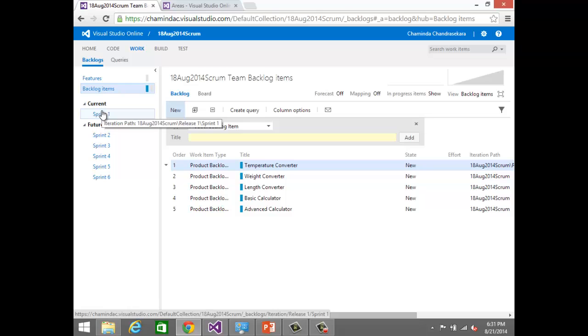Whenever you define a product backlog item or a user story or a requirement, the advice is to define them as INVEST. The I is called independent. Whichever way we look at it, in a project there will be items which have dependencies on completion of other items. So until this item gets completed, you can't even start this. Then you should have them lower in your backlog, depending on priority. But always you should have a component which you can independently develop, test and deliver.